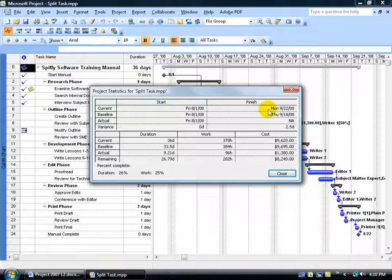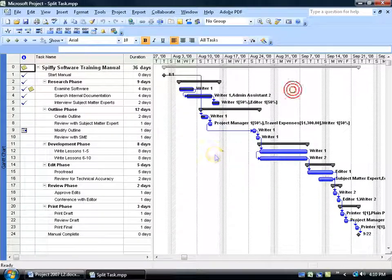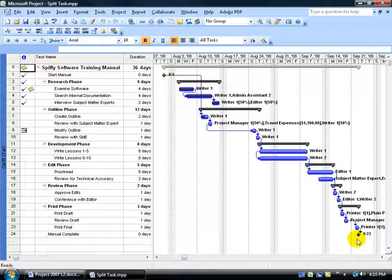In any case, my current finish date is September 22nd. My baseline was the 18th. So what happened? Let me go ahead and close out of here. What I want to do is filter in only those tasks that have slipped, which in turn has caused my project end date to slip from the 18th to the 22nd.